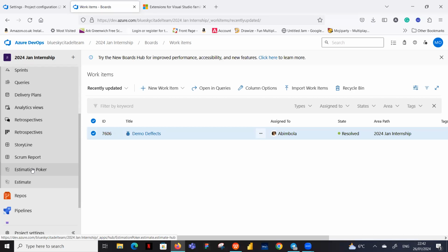And you know that with Waterfall, what you have is a particular team finishing everything they're doing before handing over to the other team. So a BA will write all the stories that are needed for that project, get the sign off of the PO or the stakeholders, and the BA is done. Now the developer picks it up, does everything she needs to do, develops the whole thing, gets the sign off, hands it over to the QA, and it's gone. And then the QA now starts testing and starts finding bugs.